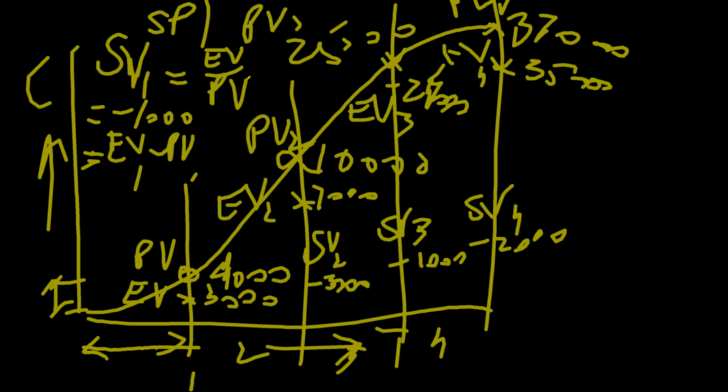Divide the whole 7,000 by 10,000. 0.7 is coming. Okay, 7 divided by 10. 0.7. So your result has decreased from 0.75 to 0.7.